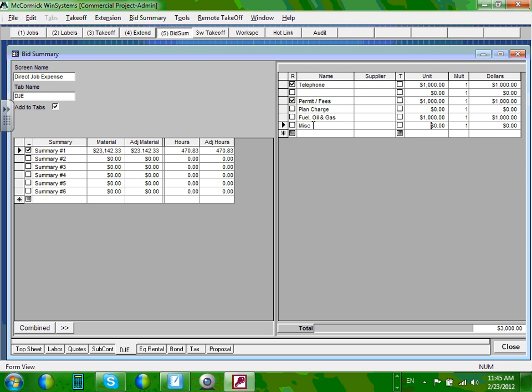As built. Do I have as built? Let's put as built at the top here. Phil, you were doing as built, right? After we design and build it, we need to redraw and give to the customer the actual installation. So go put as built, and we're going to assign a grand for the as built.